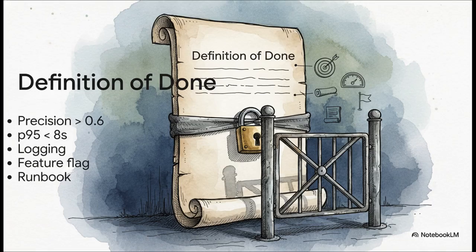Then, Priya locks in a bulletproof definition of done. She specifies evaluation precision, end-to-end latency, structured logging, feature flags, the whole shebang. By keeping this in the DoD, she ensures these are non-negotiable team standards that strictly gate the merge, rather than treating them as per-story arguments that might just get descoped on a Friday afternoon.